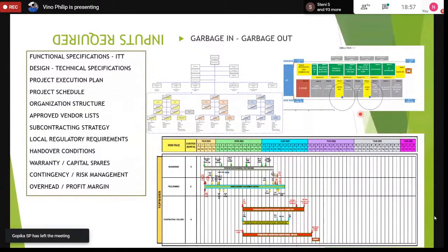So we do that conversion in a conversion yard. If we do the conversion in a conversion yard, the conversion yard itself has some capabilities for some modules. They can do certain things which are also beneficial to our schedule. So if we do these modules in the conversion yard itself, then we can integrate the other modules around it quickly, instead of waiting for these modules to come from somewhere.